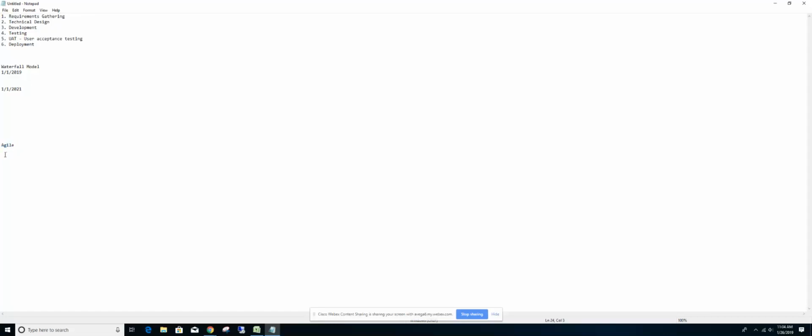So as a developer, I get my ticket. I look at the ticket, the description and everything. I write code or do some configuration changes to match that ticket and say, okay, this is ready for testing, and I assign that ticket to a tester. Before the end of the sprint or before the deployment, or at least 3 to 4 days before the deployment date, all the tickets have to be tested.